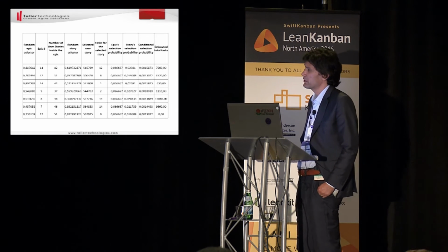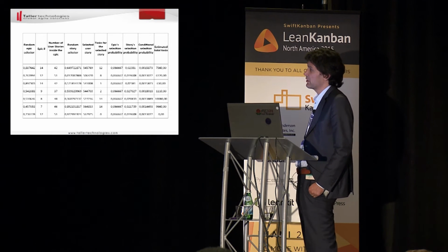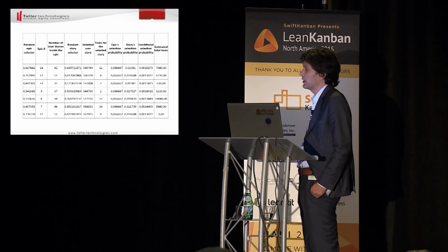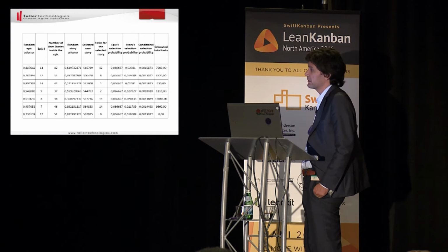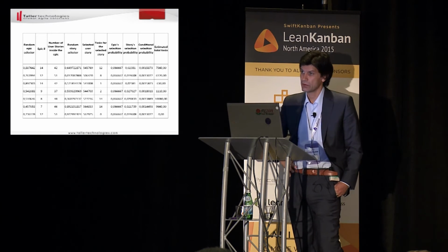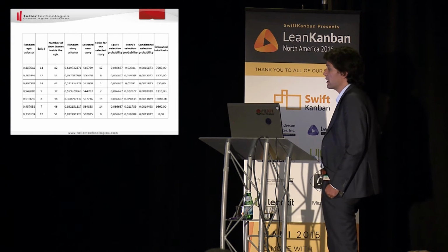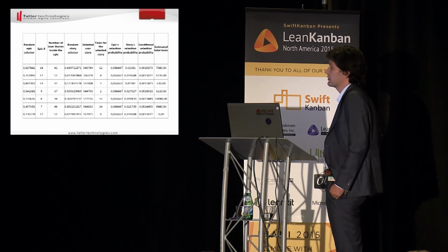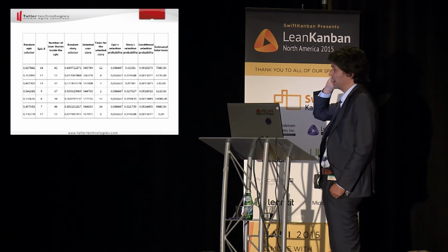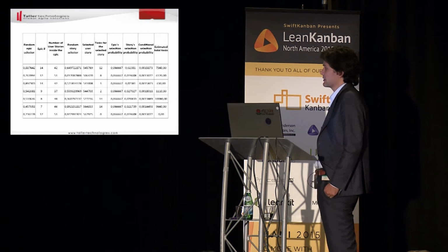For the second row, we generate another new random number. This time the sampled epic is number 12 based on the random number. And then we break the epic into 51 user stories. Then we randomly pick one of these user stories, and we analyzed it, and we found that it was 8 tasks for these stories. And using the formula, the estimated total number of tasks is 6,000 and something, right?